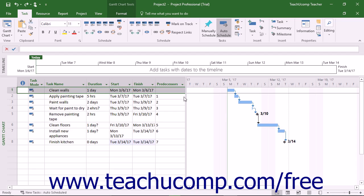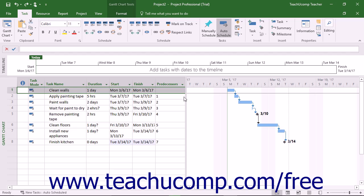One way to create a task phase is to create a task that is placed above the various subtasks within the phase. You do not need to set a duration for this task, as it is a summary task. This means its duration is calculated by the sum of durations of its subtasks. Name the task whatever you want the phase to be titled,